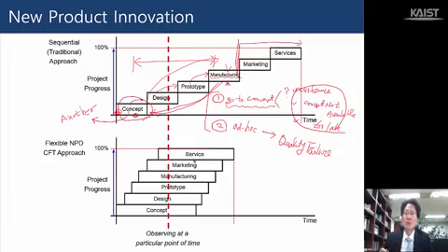On the contrary, in the flexible new product development approach, when the concept is developed, manufacturing people are working together, and therefore whenever the concept is done, manufacturing people have a chance to give their own feedback, their own assessment, their own evaluation, and therefore the concept can incorporate the manufacturing ideas, feedback and suggestions in concept development, and therefore they can identify the problem earlier.